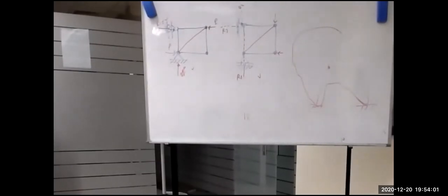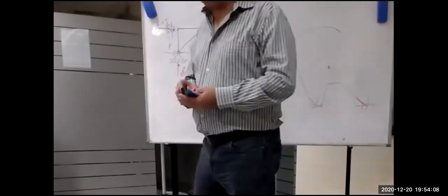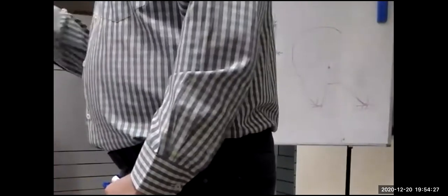A cost breakdown structure. Remember when we had the guard room excavation work package, and we had excavation work package for backfill work package, and we said we will start down and we get the cost for the 4 foundation excavation, the budget unit and unit rates multiplied by each other, and in the end we get cost for each activity, and this cost reflects in the work package above work package above work package.